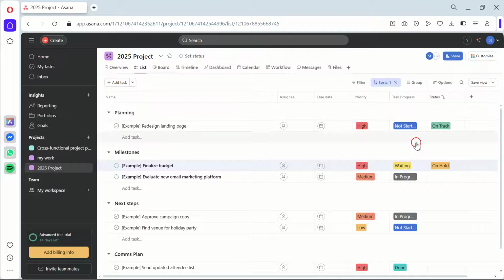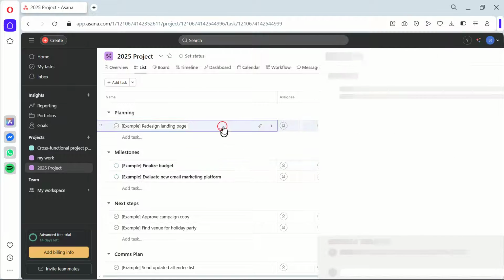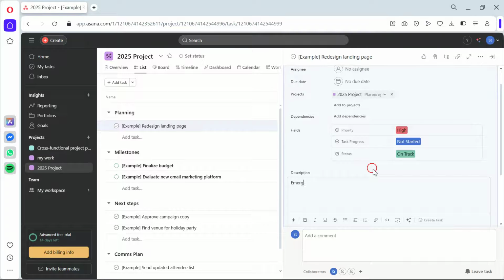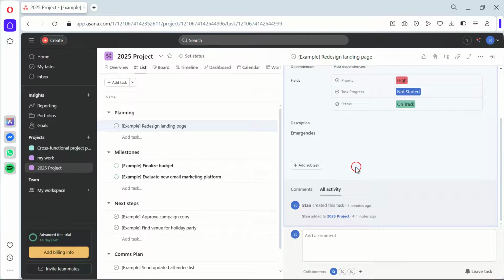Next, you have the option to leave a note explaining why you've chosen that particular status. This is not mandatory, but it's highly recommended to provide more context to your team members. Here's what's happening behind the scenes. When you add a note, it appears in the project's status history, which anyone can access at any time. And that's it. You've successfully set your project status on Asana.